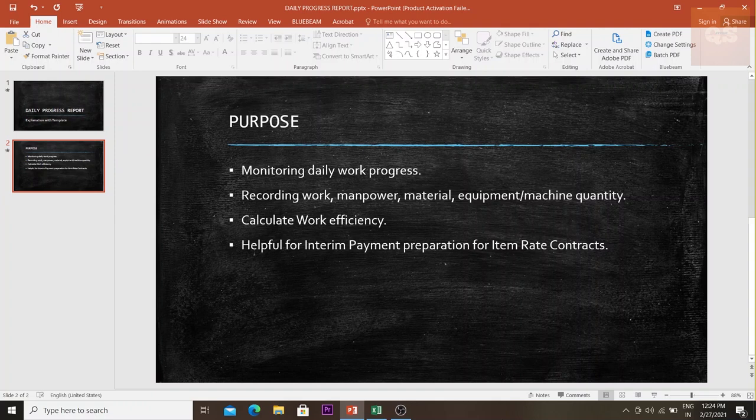By looking at the daily progress report, you can understand how many people or how much manpower has been used to carry out a particular quantity of work. Your management can then understand if the manpower is sufficient or if it needs to be increased or decreased. The workers' efficiency and the team's or supervisor's efficiency can be easily assessed using this template.